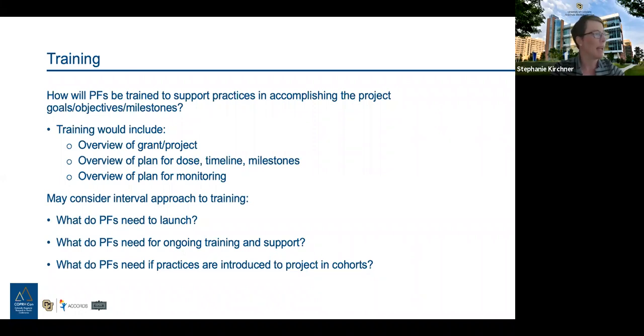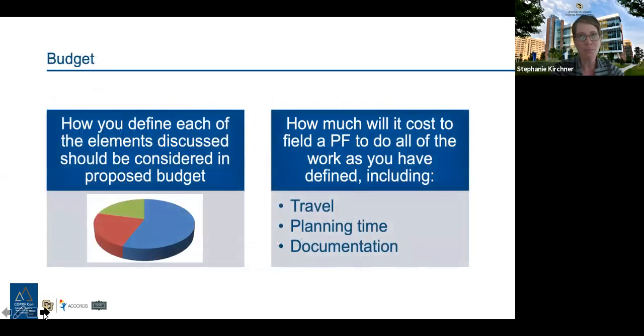But this is something else. I think my next slide is budget, to think about when you're proposing practice facilitation as a component of your implementation work. Jeanette mentioned this with one of the case studies: you're just underestimating what it would take, because we think about these very discrete touch points of site visits, but there's so much else that has to happen to support successful practice facilitation in the field that just takes cash. You have to be able to pay for those resources up front and know that those are going to be expenses to the project as it evolves.